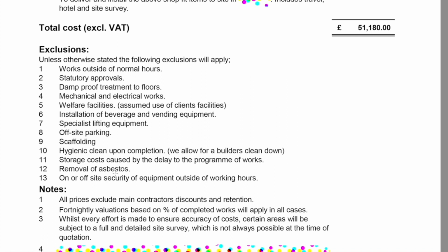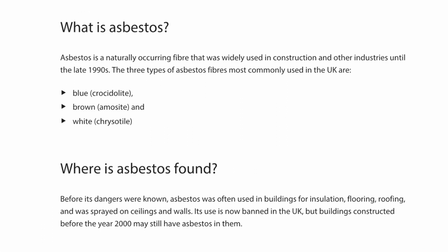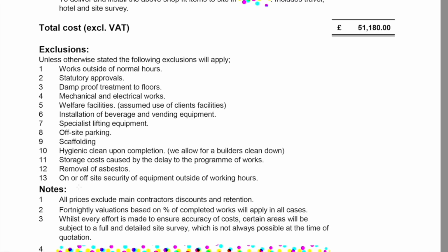Removal of asbestos. This is a big one. Always, before we start any work or anywhere that involves decoration, ripping out floors, ripping out walls, changing anything like that, we need to make sure that there's no asbestos. On or off-site security of equipment outside of working hours.